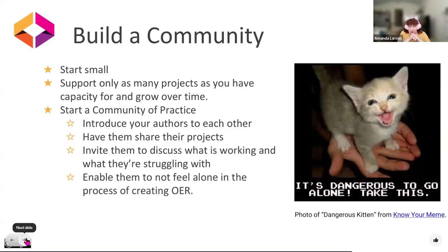I regretted it. The first time we supported 10 projects, and that was a lot to do when building a program from scratch at the very beginning. I would have started ideally with maybe three if I could go back and do it again. And then also, it allows you space to show consistent growth over time. So you did three, say, the first round, and maybe you add four more the next time. And then in the next one, you get up to that 10 mark.